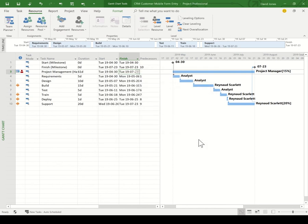Also of note, the resources can be people, equipment, or locations. For example, you may have specialized equipment that you need to use on a project, and it may need to be scheduled.